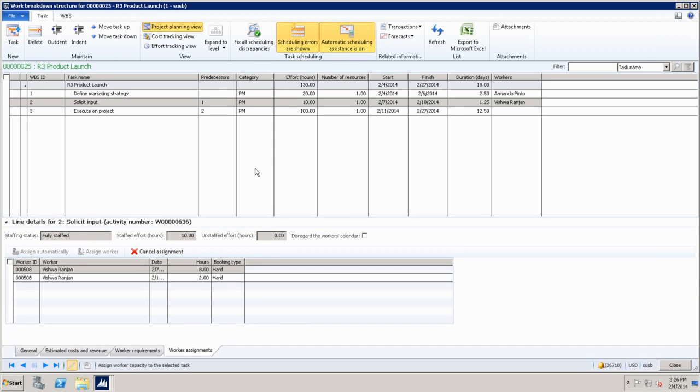Yes, absolutely. How does it do the weighting? The first thing is skill matching, competency matching, factoring in skills, education, and certification, and then availability. The primary reason is that you want people to be qualified and then available. So that's how the algorithm basically works today. And I hope the question was loud enough, so I don't need to repeat it.